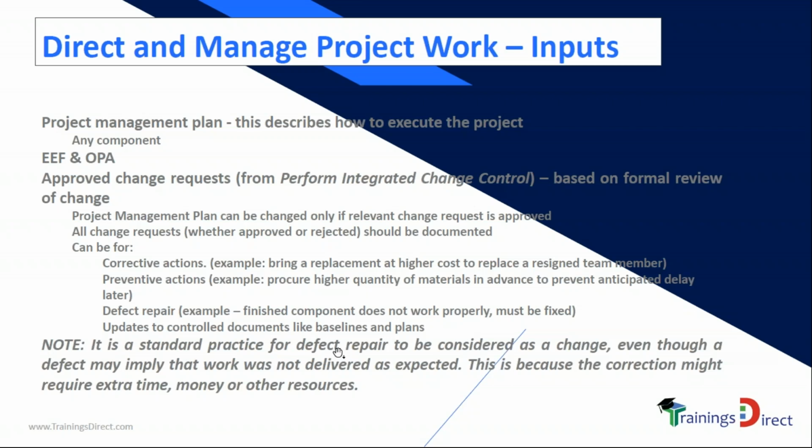If a defect doesn't require more time or money, it's okay. But still they will log it as a change request and say that the change doesn't require any additional time or money. But they still log it. They want to track the number of defects. So they do that.